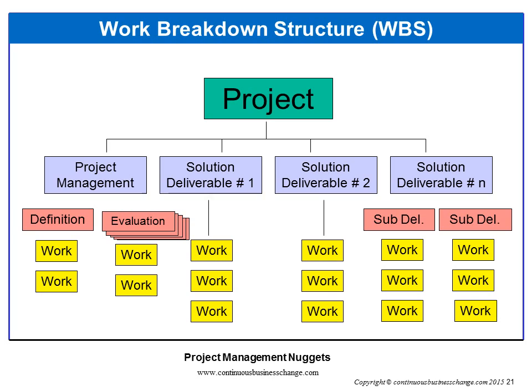Deliverables and subdeliverables are created by doing work or tasks. Work should start with a verb, like identify, create, establish, produce, and so on. All work must be included in the WBS, including the work of creating the plan, facilitating team meetings, etc., i.e., the project management work.